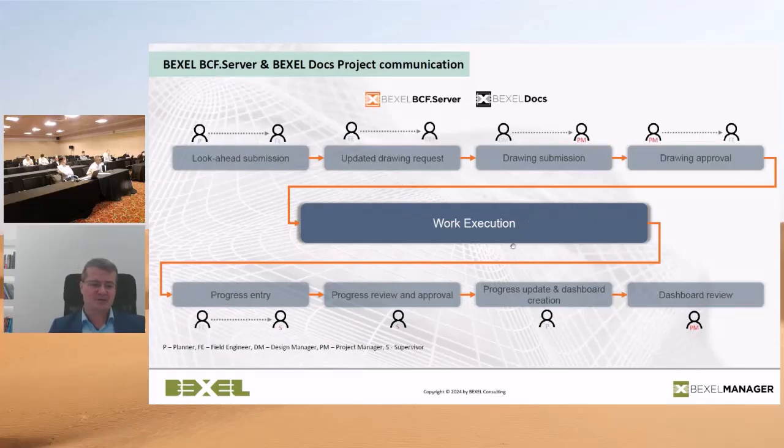Then works are executed on the site. The field engineer enters the actual progress and submits this to the supervisor. The supervisor reviews and approves, or approves with a comment.